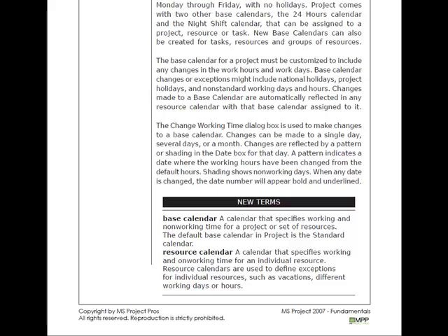So as you start to work in the resource sheet, and we'll see this later on, you can designate their base calendar. So it's going to be important to have all of the non-working time represented within your schedule so that you have a better sense of when work is actually going to get done within your project.